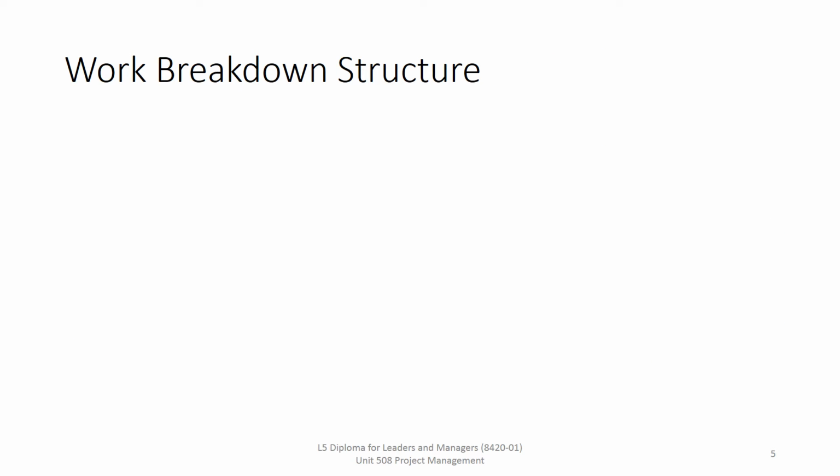So we've identified that regular monitoring of the performance against the schedule is critical for project success. And to do that, we need to collect, record and evaluate information and ensure it's kept up to date. One of the tools or techniques we can use for that is a work breakdown structure. We briefly mentioned it as part of the project plan, but it breaks the project down into small deliverables that ultimately lead to the project's overall outcome.